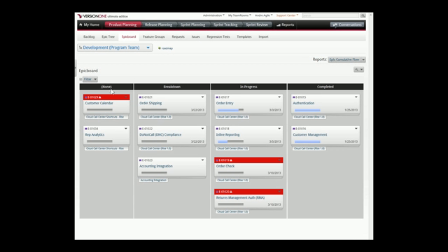So we need to replan that feature. We've learned more about it, and we want to get things from red back into green, where we have a plan that now makes sense again. So as you progress through your sprints, things could be turning yellow or red, and you'll want to do that replanning at the next sprint planning session, the next time your program or portfolio team gets together, to make those hard decisions about what's going to really be in or out for this release based on what we know right now.